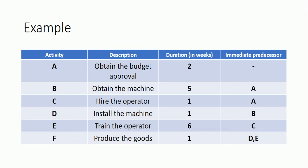Activity D — install the machine — requires one week, and Activity B (obtain the machine) must be completed first. Activity E — train the operator — requires six weeks, and Activity C (hire the operator) must be completed first. Finally, Activity F — produce the goods — requires one week, and both Activity D (install the machine) and Activity E (train the operator) must be completed before it can begin.